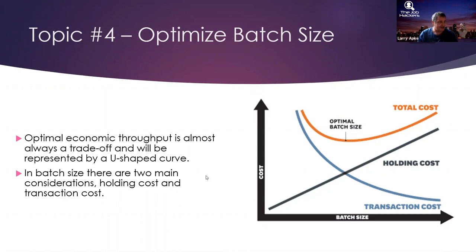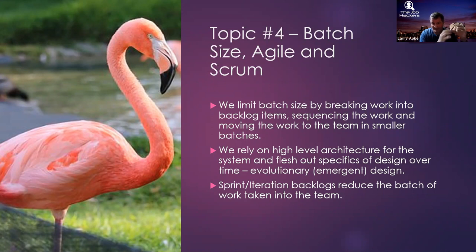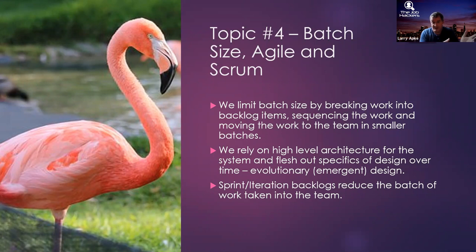We limit the batch size by breaking work into a backlog, then sequencing it and moving the smaller pieces into a sprint backlog — which is just a new, smaller batch. What is your batch size? It's two weeks. If you're tracking velocity or number of stories, your batch size is 10 stories plus or minus two — and you learn that in sprint planning. That's what you're doing: planning a smaller batch.